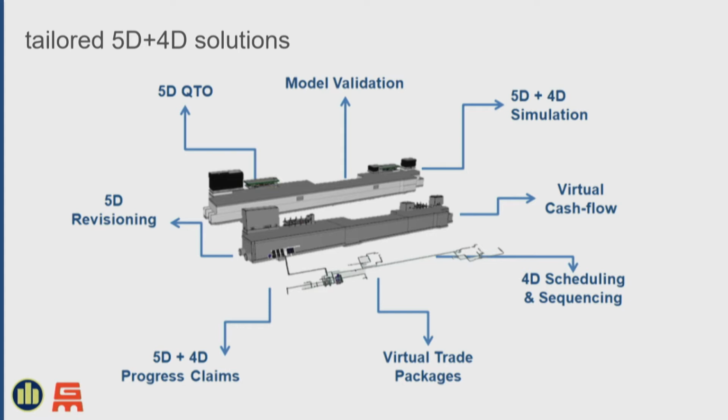The models were being updated every 2 weeks. So whereas in a 2D sense, the cost planners were probably working off a month-long iteration, we were starting to say, well, actually, let's work off the latest. Every time those models drop in a fortnight, we're going to use that and quantify it as well.